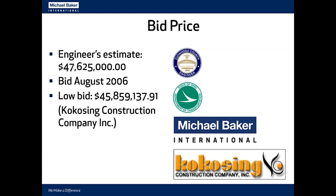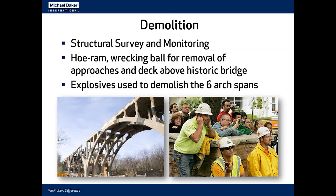The project was bid in 2006 — a time of rapidly escalating bid prices before the housing bubble burst. Despite that, we were rewarded with a low bid that came in under the engineer's estimate. The low bidder was Kokosing Construction Company, a pleasure to work with. The Ohio Department of Transportation provided oversight during construction. Construction began with demolition of the existing bridge — the superstructure was removed manually, but explosives were used to demolish the six arch spans.